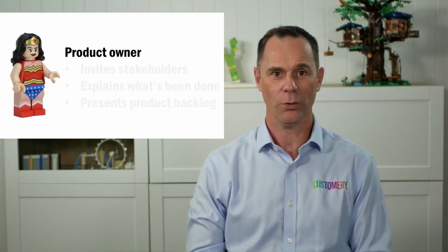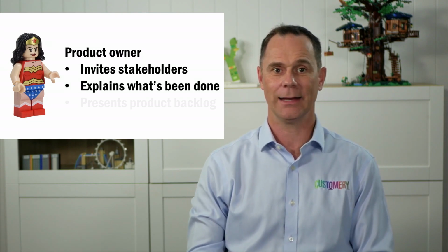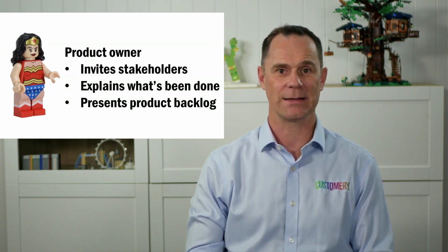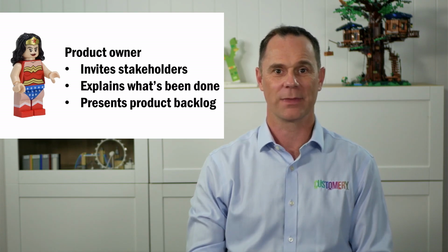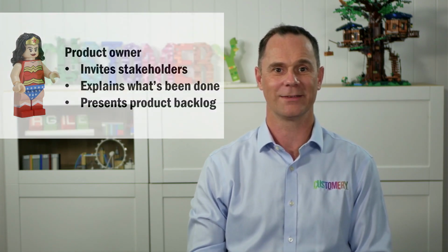The product owner's role in the sprint review is to invite any key stakeholders she thinks should take part. She explains what items have been done and not done, and she presents the product backlog as it stands, and any forecast delivery or release dates based on current progress.